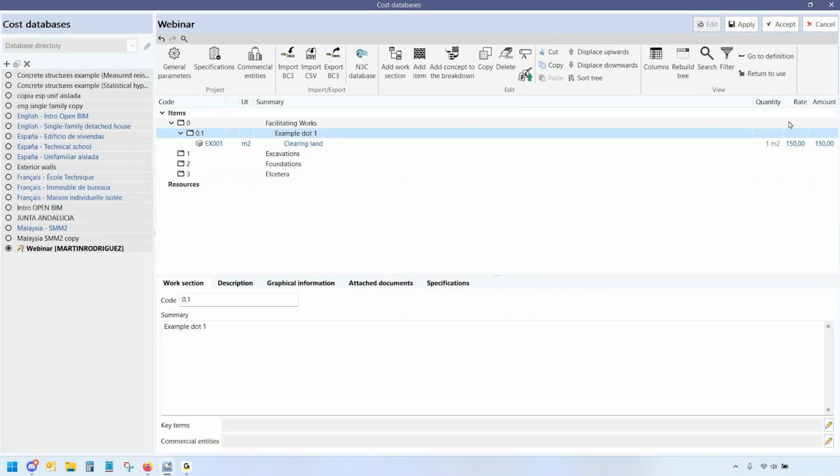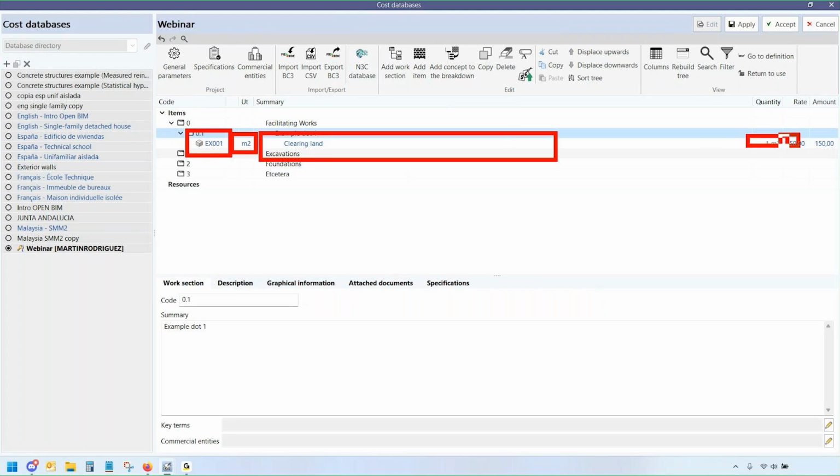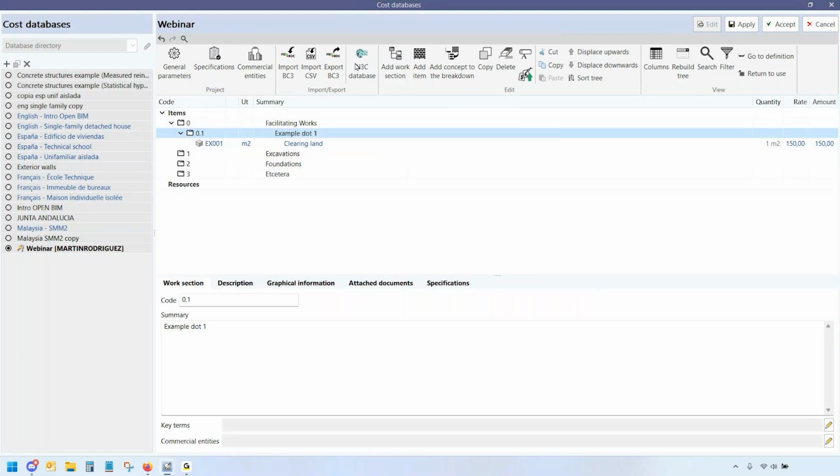Once you've done this once in one project, the next one, you have it already there. We don't have to start from scratch. We may import CSV files. This would come from a spreadsheet, from Excel, whatever. So as long as the format is consistent with this structure of information, it is possible to recover the information that we may have from previous projects, from manufacturer catalogs, and so on, to generate our own codes database.